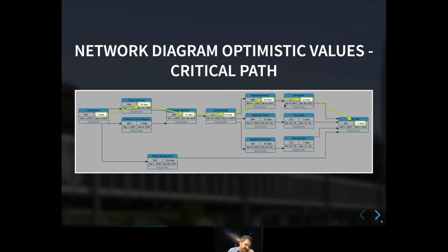What happens if I just take more pessimistic values? What is then happening? You get a better idea what would happen with your critical path and what the consequence is on your project end date. Roughly said, this is the idea of why you do these PERT estimations: to get better, more realistic project end estimations.